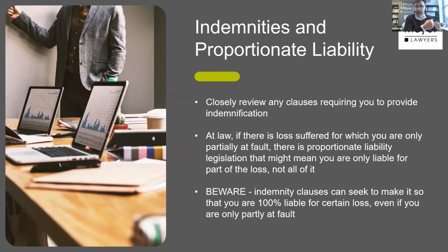So that becomes the tension, the battle. I'm trying to build in proportionality. They're trying to remove proportionality. They'll have a clause that says there is certain legislation that talks about proportionality, unsurprisingly referred to as the proportionate liability legislation. It's got a longer name than that, but it basically mandates as a matter of law this concept of proportionality of liability, so it's commensurate to your level of fault. And you'll see in contracts, ubiquitous in contracts, where it says the proportionate liability legislation is excluded from this contract.